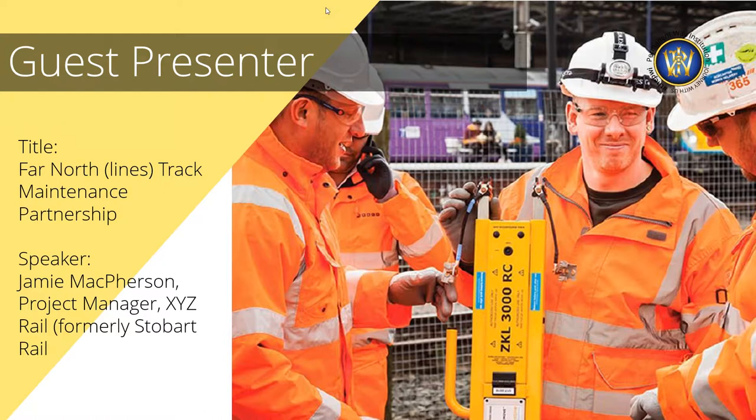There were sections with concrete sleepers up there, but we never got involved. We actually got a reduced specification because some of the job we went to replace concrete for timbers, but that got removed from us because we put in some TQs asking the question, what's the benefit? But I certainly recall, and I'm sure a lot of people on the call have had experience of this, that concretes on jointed track generally got completely destroyed at the joints. And often hardwood timbers would be put in their place to give them a bit of help at the concrete sections.